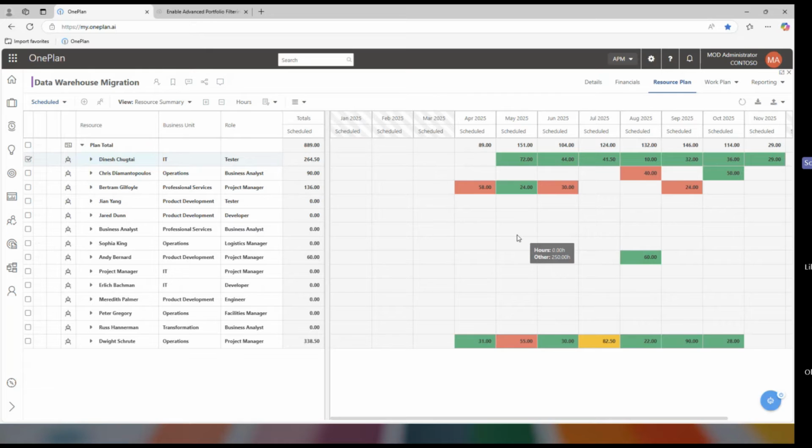But I like to warn people that if you are doing more bottom-up resource planning, you want to make sure that you have sufficient time to do it. So, maybe one project manager per 1,000 active tasks or something like that, right? It's not going to work if you're trying to manage thousands of active tasks. It's just too much time than you have.